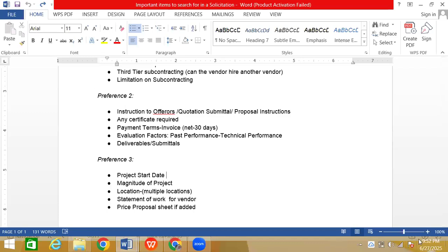For example, if today is the 27th and I spoke to the vendor today for a roofing contract, let's suppose. So they will ask you, when do you need the work done? So I have to keep in mind that the due date for this contract is 7 days away or whatever days away. And then even after that, the client takes like a month or so. So I'll just make it like next month, and tell them, not an exact date, but a probable date kind of thing.